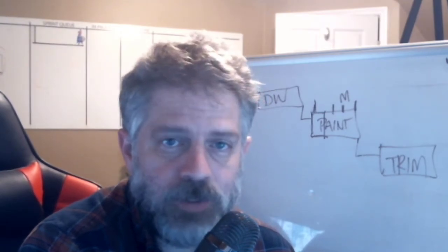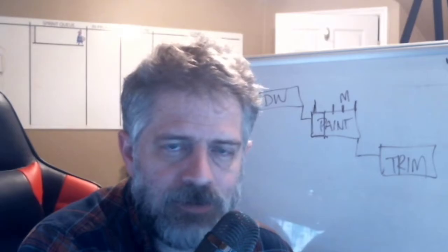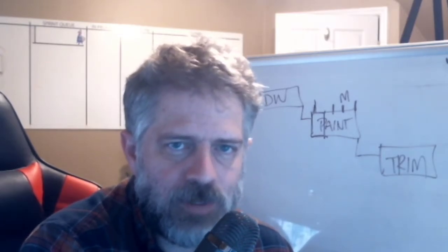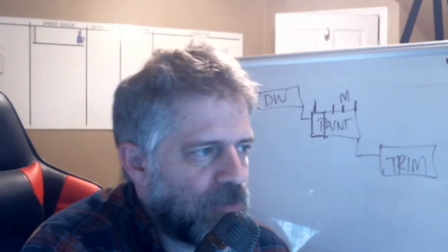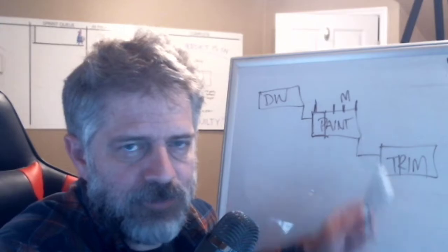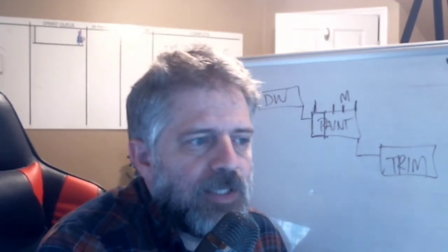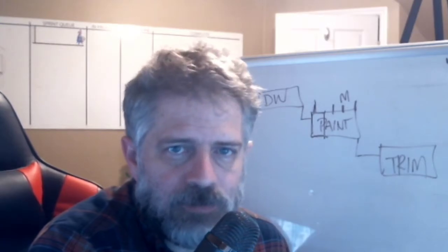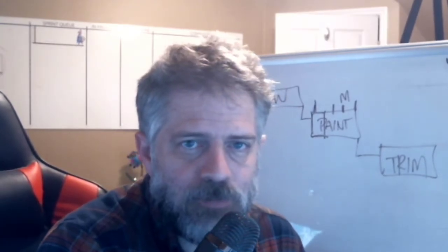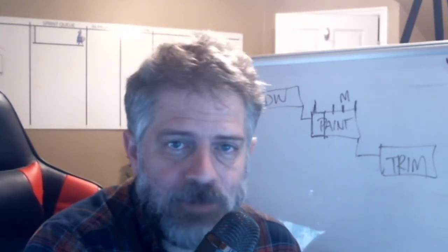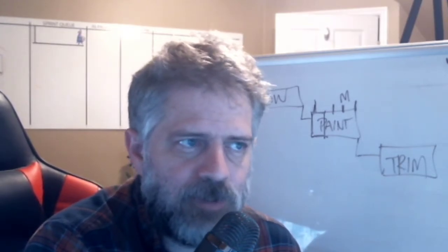And then he just sends one guy over to kind of deliver the paint. Not the 2 or 3 guys that should be there for 4 solid days to get it done in 4 days. I'm still not concerned, and I'll tell him, hey, can you still get it done? I have the trim carpenter coming on that Tuesday or whatever. Yeah, I think so. All of a sudden, we've consumed enough margin that I'm starting to be concerned. But what can you do? I can't go get another painter at that point to come in and fix the problem.